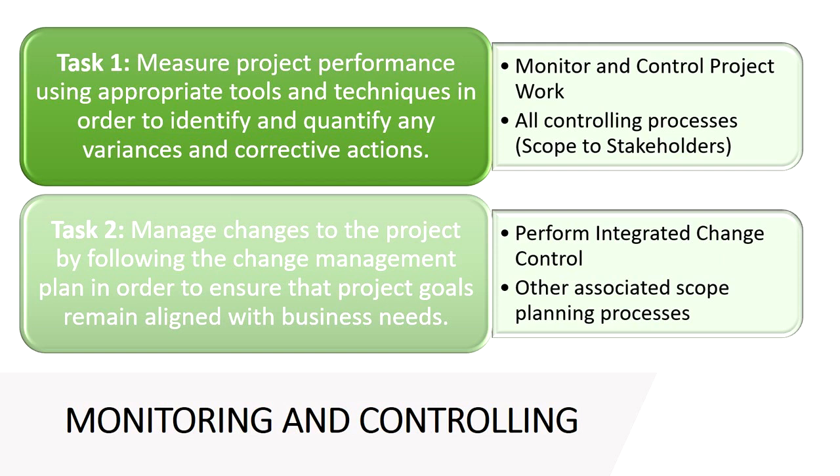The change control board takes the change request and the analysis by the team. Along with their analysis, they arrive at a decision. So they analyze the change request. They may refer to the documentation or the background that the PM has presented based on the meeting with other team members, and they call the shots. Yes, we're going to approve it, or we're going to reject it, or we're going to put it into a pending status, put it on hold. So these dynamics are very important.